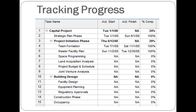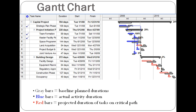To track progress of tasks after one has been completed, one should enter the actual start and finish dates in the tracking table of Microsoft Project, as shown here. You can see the first three subtasks' dates have been entered, and subsequently they are indicated as being 100% complete. After dates are entered for completed tasks, the duration is updated. The entire project is now estimated to be 784 days, because the first three subtasks took 109 days, 89 days, and 42 days, respectively.